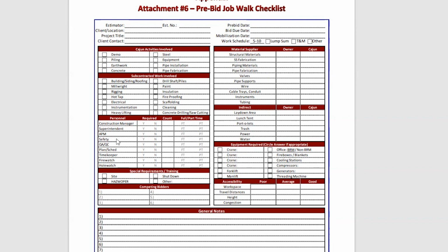Granted, what I'm discussing here is a give or take $2 million job. So you could assess a staff build as you're walking through. You maybe even make some initial judgments on a crane by looking at what you have to install, looking at where you'd have to set it in relation to the existing pipe racks or other equipment or buildings. And you could kind of frame where you thought you were going to go early with this type of document.